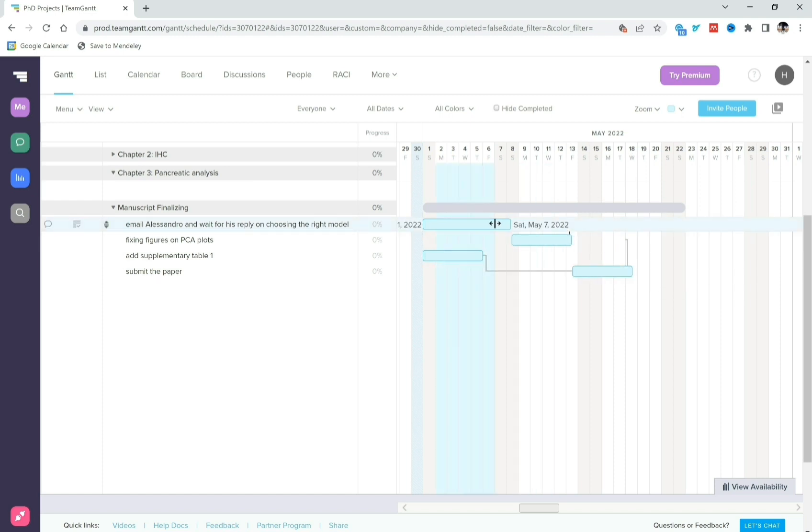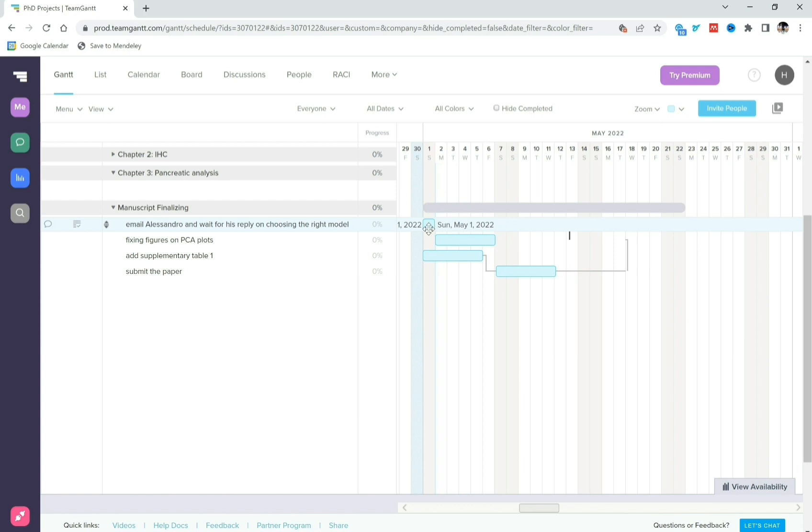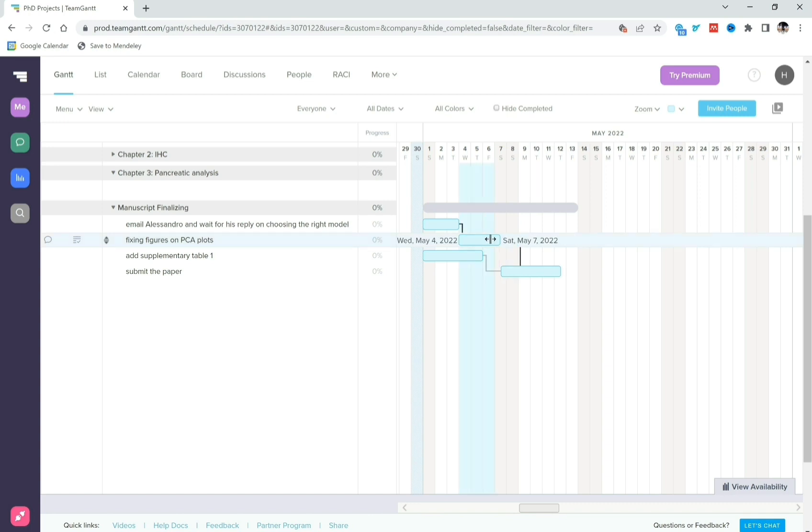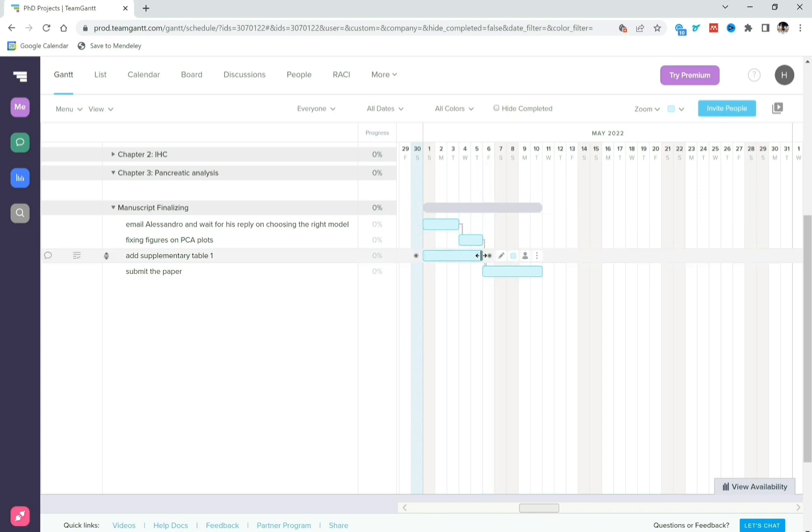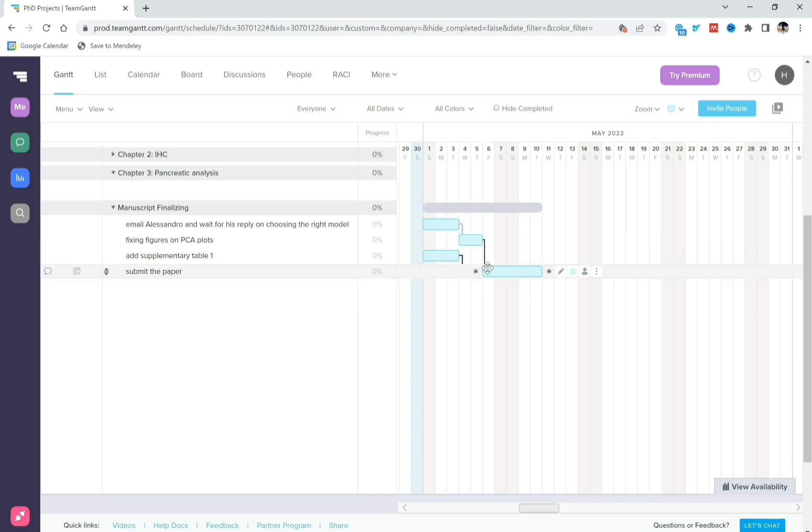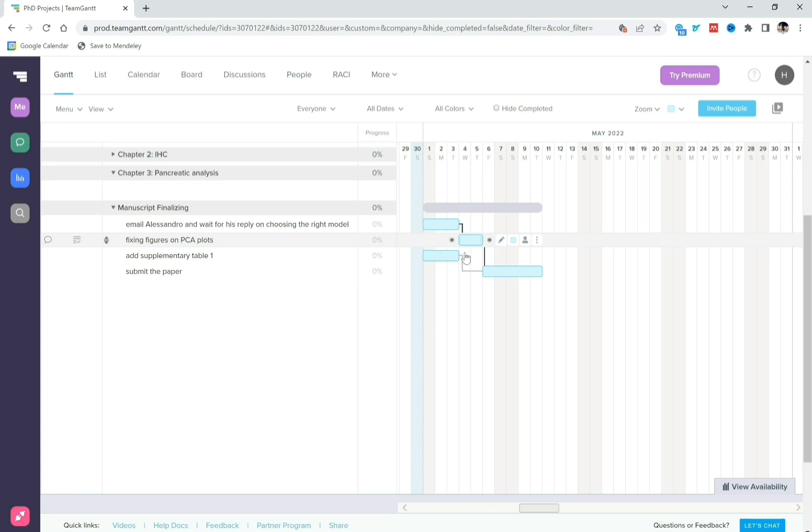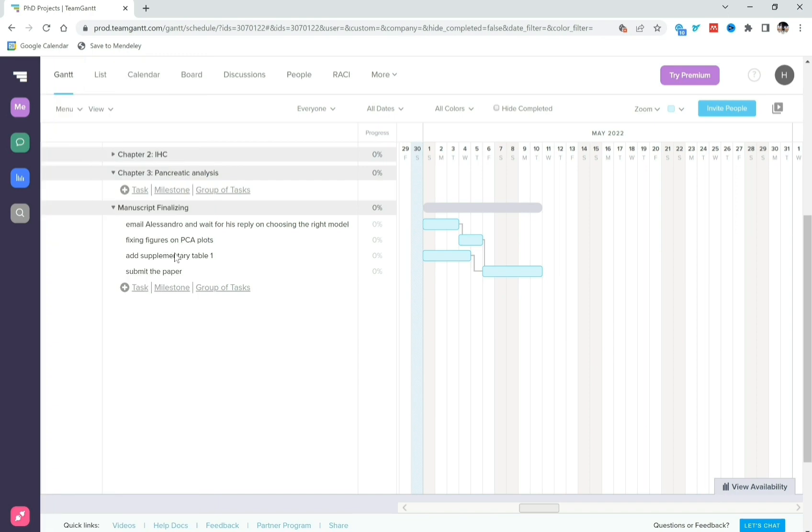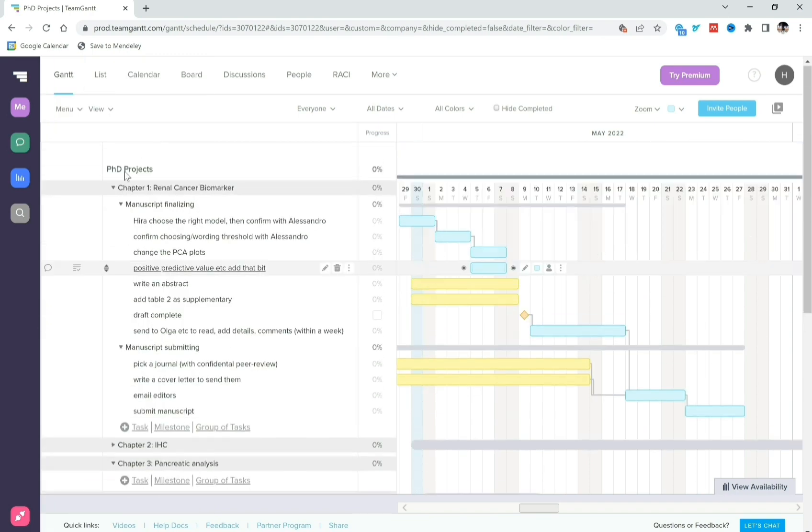Now say he gets back to me quicker and then I can actually submit this sooner. Say I fix the figures really quickly, I can actually move this back. You see, if I do any of these tasks earlier then this will move back, assuming that there's no other task which is keeping it from being submitted. So this is like really really cool and extremely powerful and I'm having so much fun. This is what I've made for the whole thing.